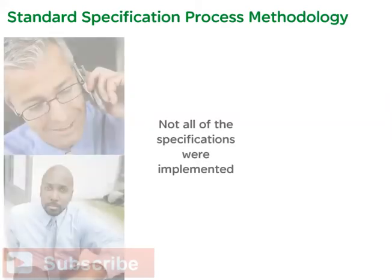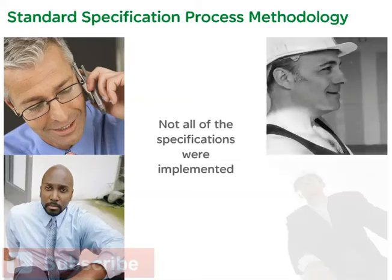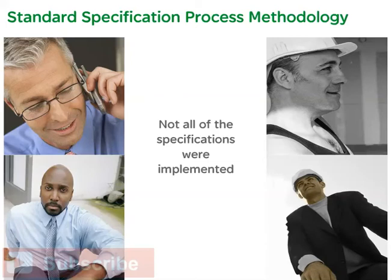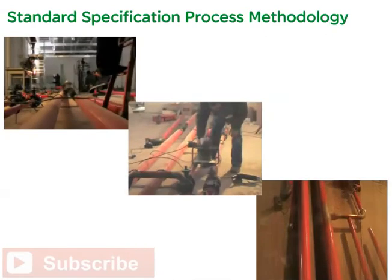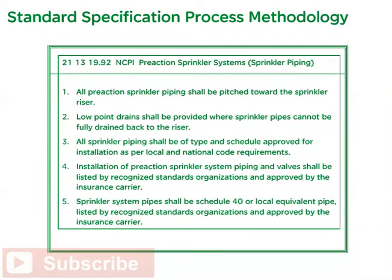Not all specifications in Kelly's and Crawford's system specification and project manual were implemented. During the actual construction process, electrical and HVAC tradespeople were assigned specifications to work on based upon the CSI numbering scheme. A plumbing contractor, for instance, was made responsible for executing specifications under the 220500 number, entitled 'Common Work Results from Plumbing.' However, from time to time contractors ran across specifications requiring higher criticality or in conflict with other items. In these cases, both the contractor and the owner agreed to apply the well-known industry convention of marking inapplicable items by crossing them out and marking them NIC, or 'not in contract.'